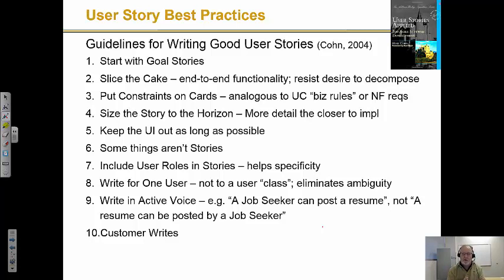Well, no, they're really not stories. The end user need was persisting data. Those things that you're doing, that decomposition, is what the developers need to do to create tasks to make the story real in the system. All right, and we're going to talk about defining tasks as well. But in terms of writing a good user story, don't be afraid of that. That user story should, in fact, touch on several different envisioned components of the architecture of your system. All right. Put constraints on cards. All right.